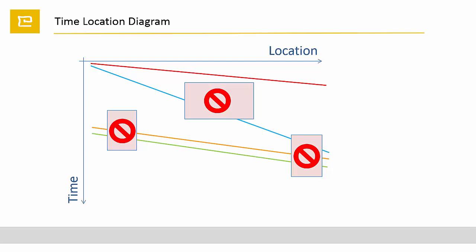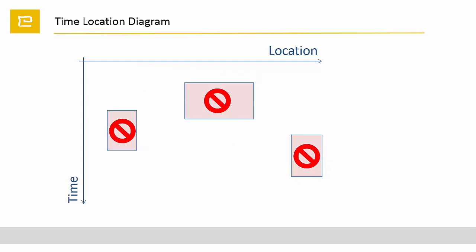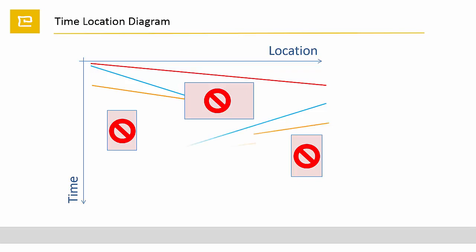The clue is first locating the blockings, then fitting the task in the remaining place. Sometimes you have to cut the process and relocate the equipment, but in sum there is an optimized schedule still very near to the original duration.